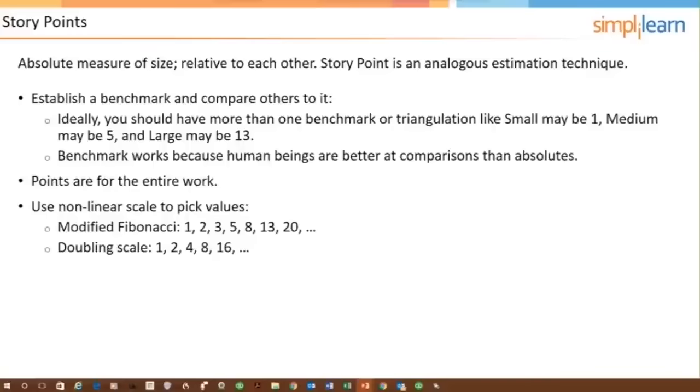But comparing the coconut to our baseline of 2, right, we came up with a baseline of 2 for the smallest user story. We compare eating coconuts to that baseline and we say, okay, it's going to take more effort to eat the coconut than it is to eat grapes or apples.